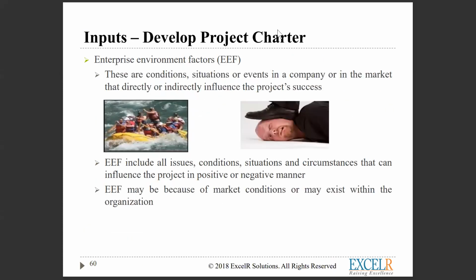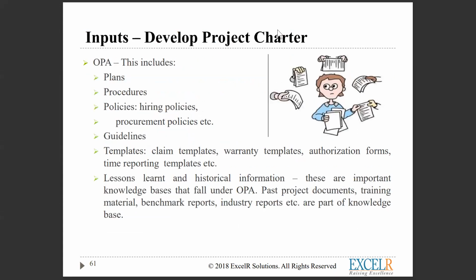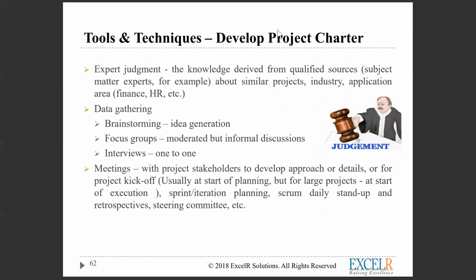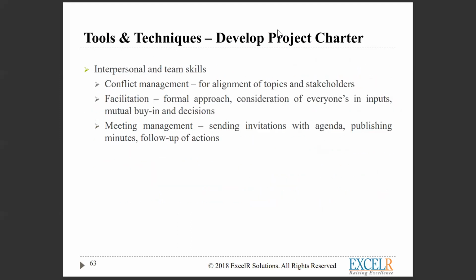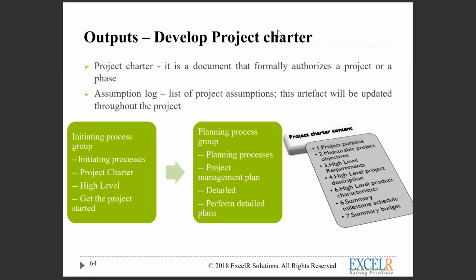So this is what I'll talk about. Enterprise environmental factors, develop project charter. The same thing I discussed earlier: the lessons learned, guidelines, templates, what templates he has to use, authorization forms, what timing reporting he has to do. Everything he needs to capture goes into the project charter. Tools and techniques: data gathering, focus groups, interviews, meetings, project kickoff, sprint or iteration planning, daily stand-up meeting if you're executing the project under the agile methodology, and retrospective meeting. Then conflict management, facilitation, meeting management. The outputs are your project charter and assumption log. These are the two outputs.